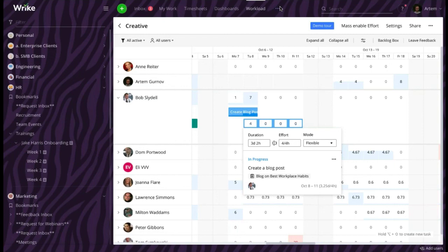But we need to remember an important thing. All reports are built upon a certain source. When you are building a report, you are selecting one or several locations that serve as the source for that report, and the report only shows items from these specified locations.